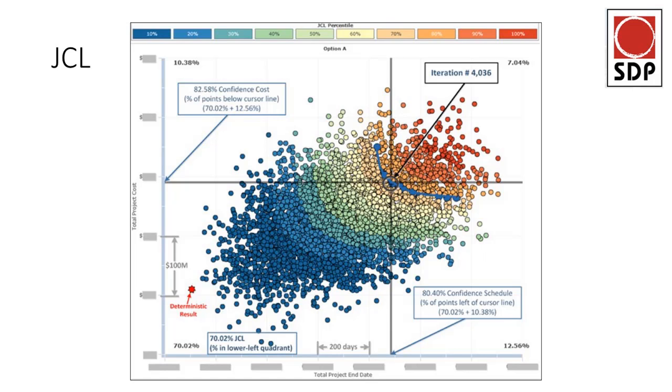and the cost guy has now sweated, and he's split his cost into time dependent and time independent, and he's allocated it, and I've forced him to demarcate the control accounts that are going to go into his SAP or whatever financial system he wants to run. I have yet to come across a project manager who hasn't said to me, I now for the first time have a one-page view of what this project is all about, and I can see where the risks are coming in.